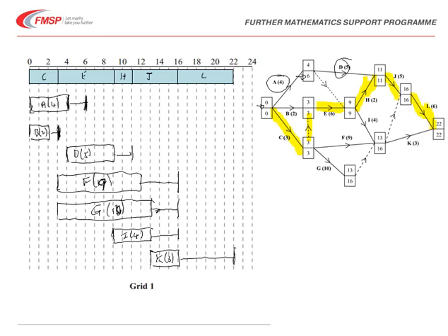It then goes on and says, what's the minimum number of workers that are going to be required for this? Now, this is a case of taking what's called a timeline and moving it across the diagram. So if I draw a line in here, I'm trying to work out how many workers are required at any one point.